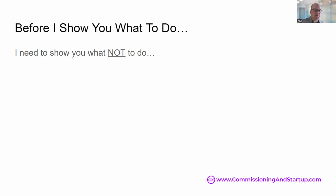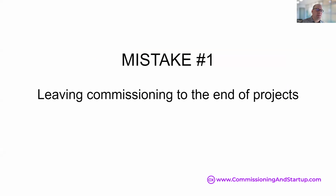Now, there's two common mistakes that are often made on projects, and just by fixing these two mistakes, projects can see huge improvements. So what are these two mistakes? The first mistake is leaving commissioning to the end of projects. We've been told for the longest time that commissioning takes place at the end of projects, right? We need to finish construction and then we'll test everything at the end. But this is actually not true. This is, of course, what most projects do. They cross their fingers and roll the dice at the end. And maybe you've had this experience on projects, but this is what leads to problems on projects.